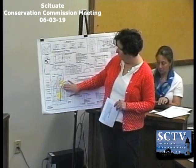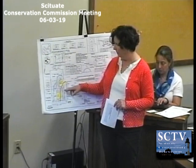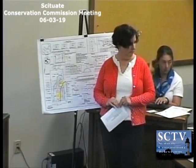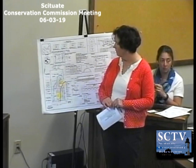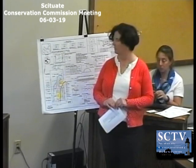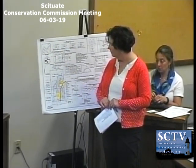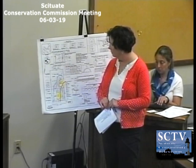And you wouldn't consider shortening the frontage of this house or the backage, however this is, and then moving, I don't know what's involved with having 2 septics on one property or over the property line. Sure. We were very fortunate in the case here because Mr. Walden owns both properties. To site a septic system on the back property, which typically we do, typically we keep the septic on the same lot as the house, it would be within the 50-foot buffer zone. But because we have the ability here to kick it almost entirely outside the 50, we're providing it within an easement on that front lot. That's the only reason it's located there. To put it on that back lot would be inside of the 50-foot buffer, if that's where the buffer winds up being.